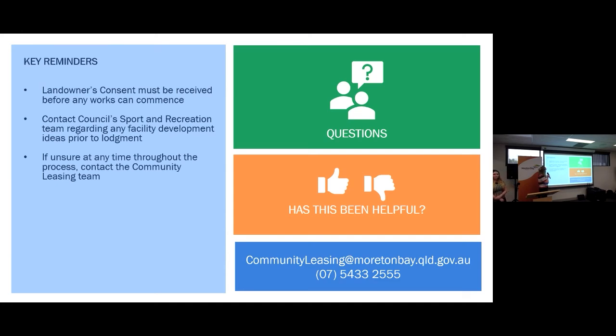So landowners' consent must be received before any works can commence. That's probably the most important thing. In terms of those larger scale developments, so if we're talking the Tiddlywinks project and they're doing that quite large shed, they're doing an upgrade, that basic facility development, contact council's sport and rec team and talk through those ideas first. Not necessary if you've got such a small scale, but you don't know what might be the works at council before you go ahead and do something.